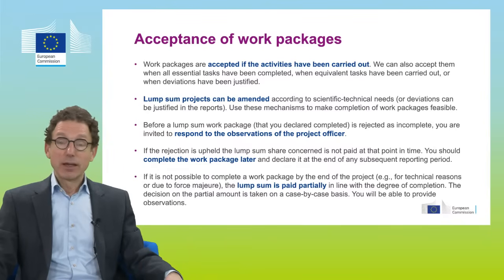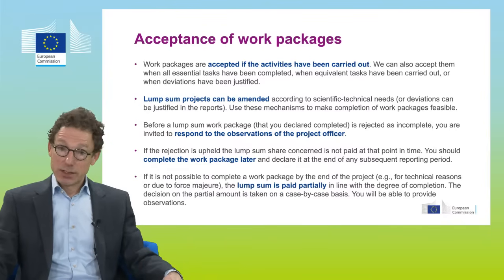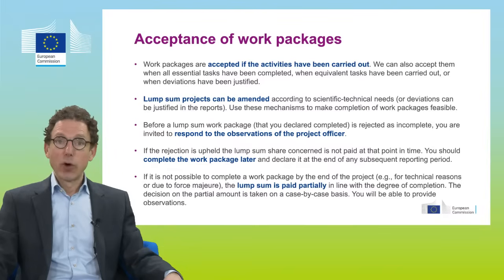If ever a work package is rejected, the project officer will always give you the opportunity to explain why, in your view, it is in fact complete. In other words, there is an interaction to hear your position on why you believe it is complete or completed to a higher degree. And only after that, there is a final decision by the project officer to accept partially or not to accept your work package. We mentioned already, you will always get the possibility to report and to improve your work packages